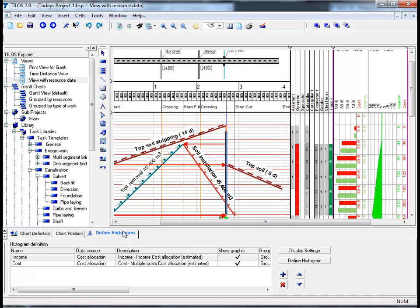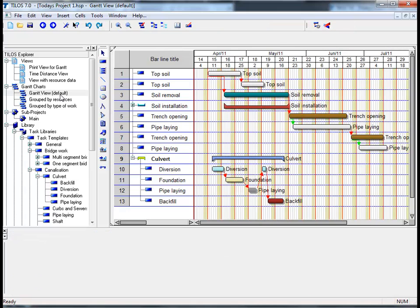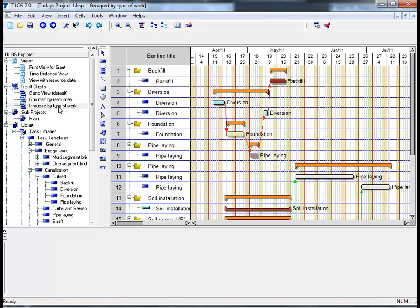The project that we have been working on during this session can also be displayed in a number of graphical styles. If I go to the Tylos Explorer and click on Gantt view default, this default view chart displays the entire project as a Gantt chart. Gantt charts, however, can be flexibly defined by setting filters and grouping stations. By proceeding to grouped by type of work, if I click on this.